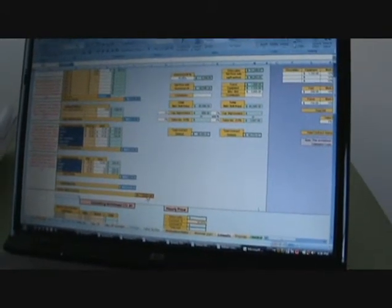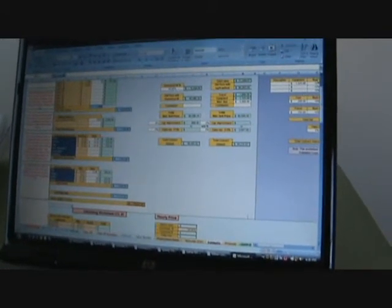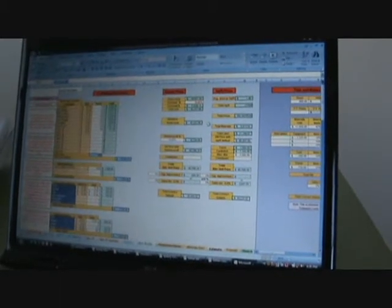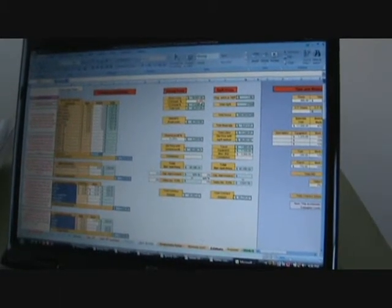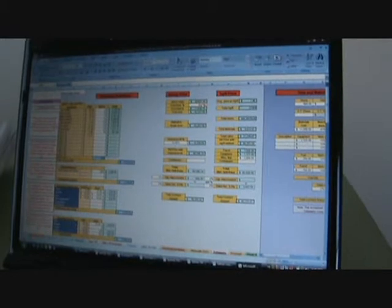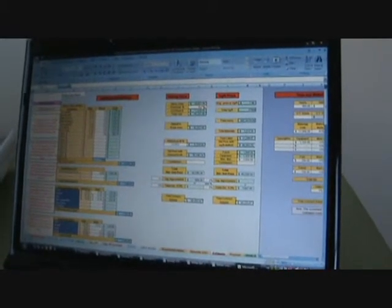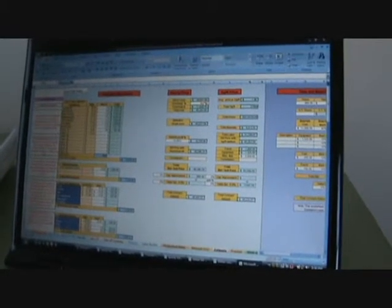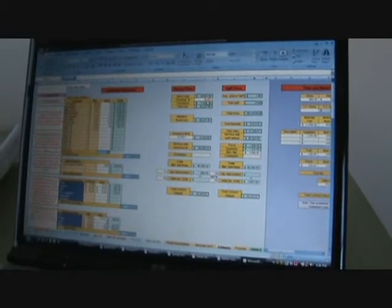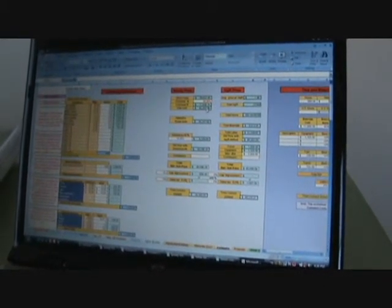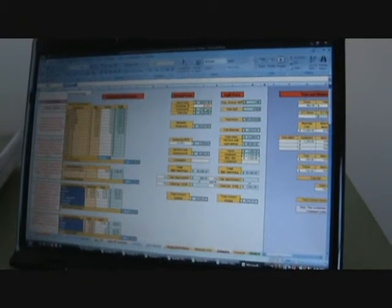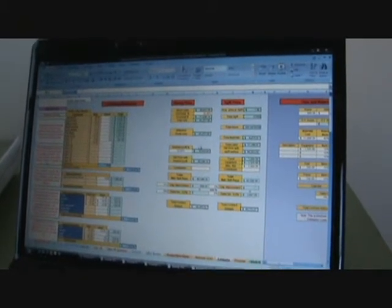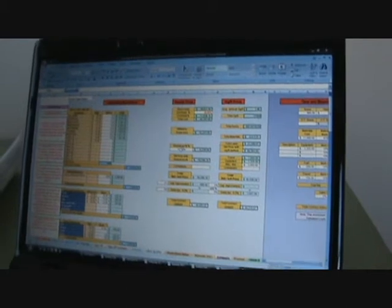And then your material costs will carry off here. That's your total costs, labor materials, everything. Then you come over here, and whatever your overhead is, you can change this to your markup. 38% is what I go by. A little high, but we don't do the volume as some of the other bigger contractors, so our overhead's a little bit higher percentage. So there's what you're going to take out of the job for overhead, and then you mark a profit on top of that.